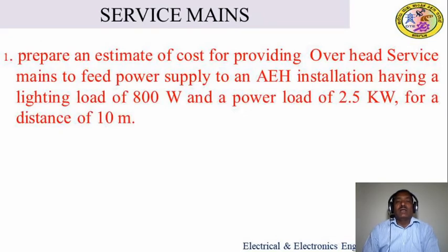So here I have taken one problem of a single phase overhead service system. Prepare an estimate of cost for providing an overhead service mains to give power supply to an installation having a lighting load of 800 watts and a power load of 2.5 kilowatt for a distance of 10 meters. So here we have to prepare a schedule of materials and a calculation of materials. In the next sessions we will go to the estimating.